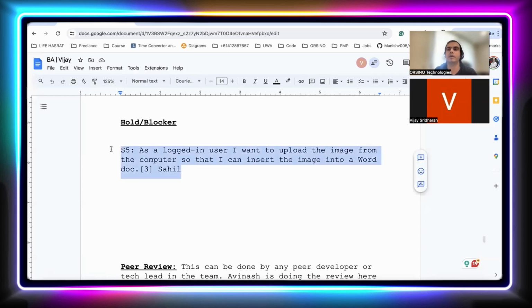If the requirements are not clear, the BA comes into the picture. If there is a dependent user story, the Scrum team needs to reallocate their priority and start working on the user story which this one depends on. Got it. So if a priority change happens on a ticket, it may also go into hold status? Not exactly like that. But yeah, you can do that.